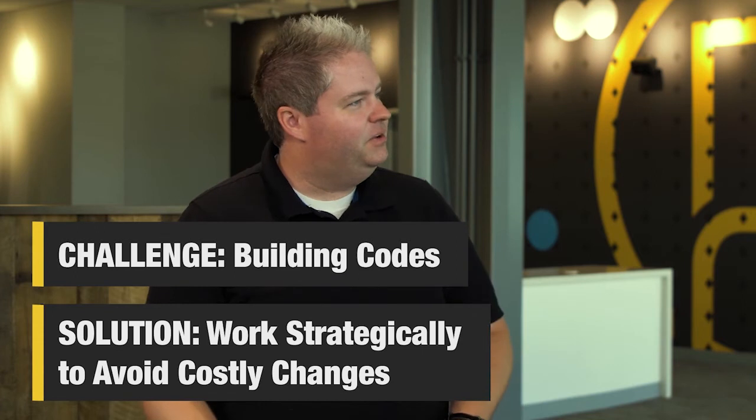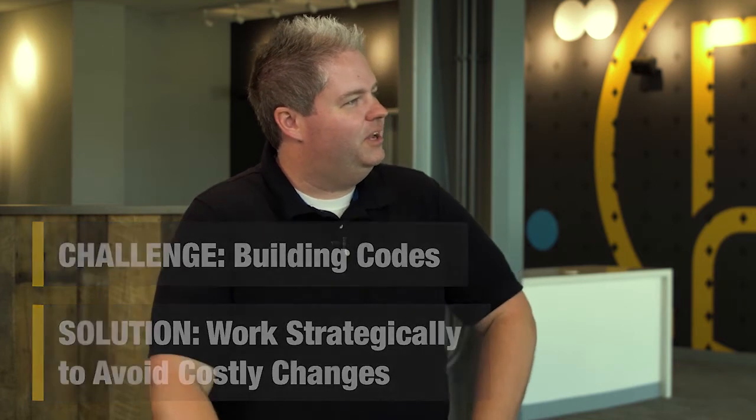Any pitfalls that you think we came across? Well, I think obviously plumbing had been done previously by volunteers when the original design had been put together. We found some issues and things that needed to be corrected. They weren't huge deals, but when they came up, thankfully we had contingency funds to navigate and take care of those things.